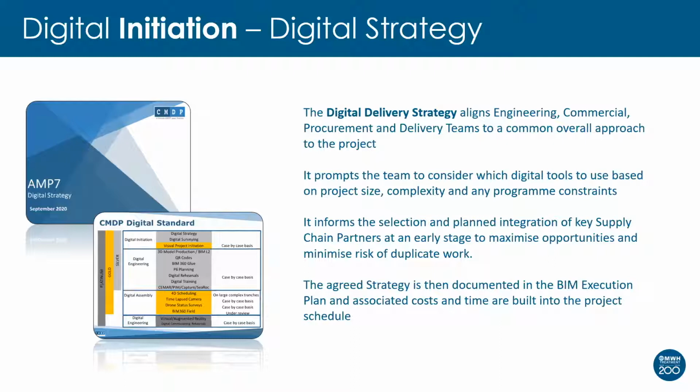By setting the strategy out at the beginning, it brings everybody on board, including your key supply chain partners, at an early stage, which maximises the opportunity and minimises the risk. By bringing those guys in early, you minimise the rework that you often find on an older traditional approach to a project, where a design consultant produces a design, it gets issued to a supply chain, and they look at it and say, I wouldn't have done it like that. Why don't we do it like this? So it just facilitates bringing those guys in earlier.